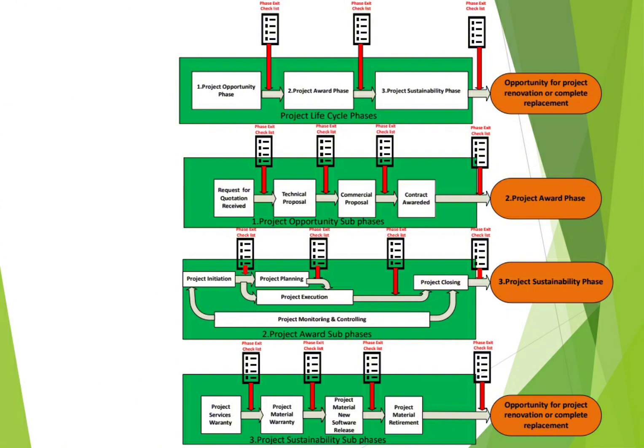So once you have this, you will ask your planner to start building the project time schedule based on this list of activities with the duration of these activities and the interrelationship between the activities. And sure, there should be communication with your project planner and the technical lead of this project, and maybe multiple meetings until the baseline time schedule is issued.